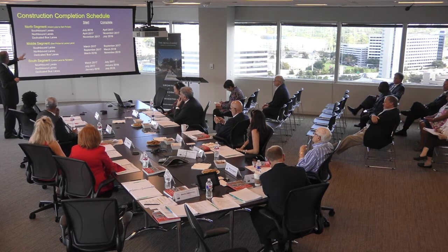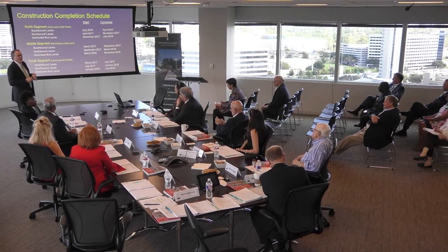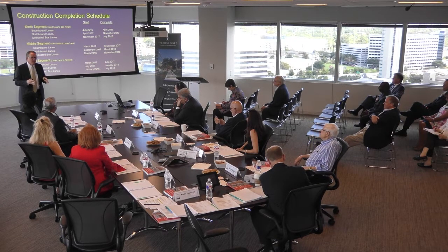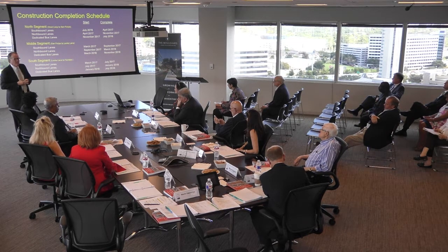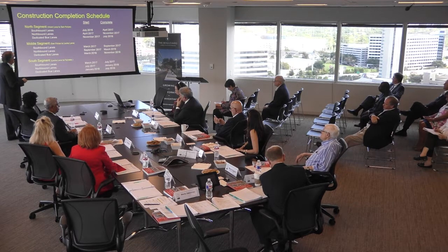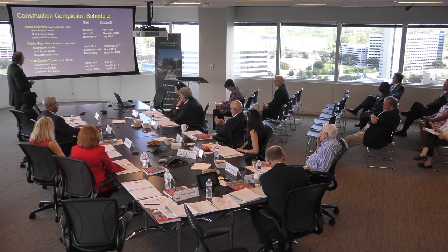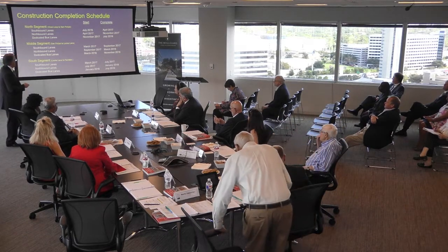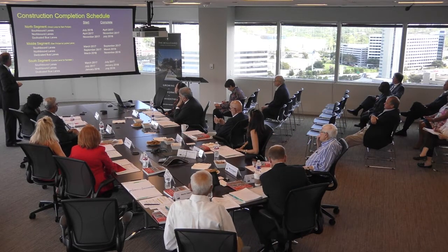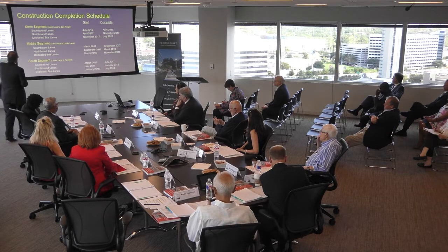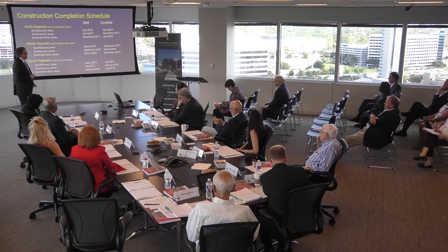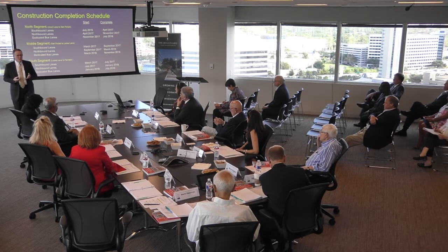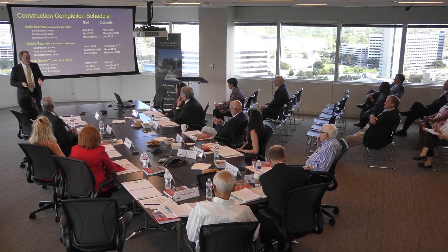Robert. North segment, real quickly, southbound. We should have the 3-lane southbound finished by spring of 2017. We'll then have the northbound lanes completed by November, fall of next year, and then we'll begin working on that centerpiece, that 46 feet in the middle. Then the pieces to the south here, beginning after Super Bowl and being completed by late 2018.